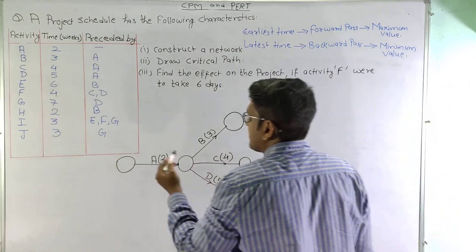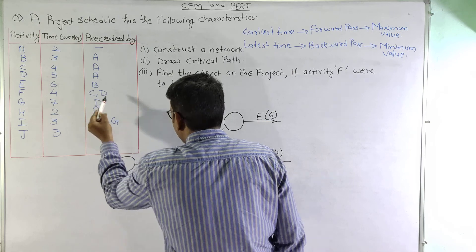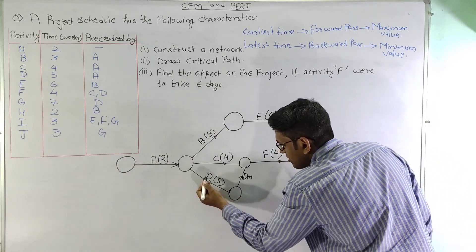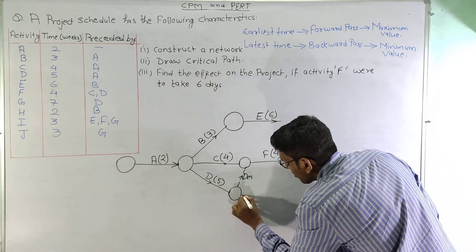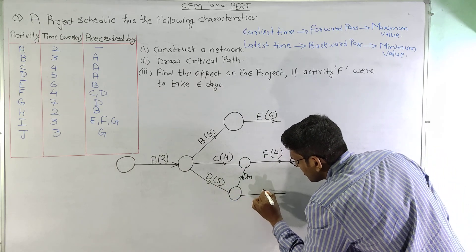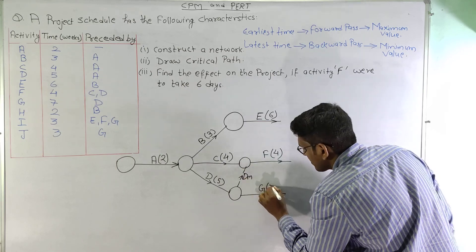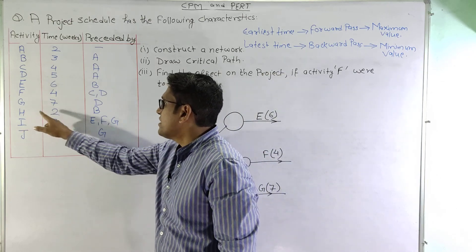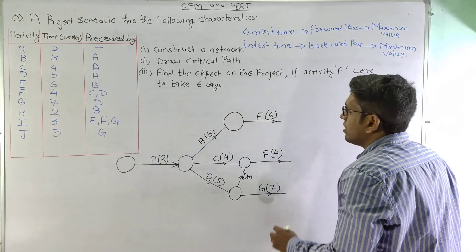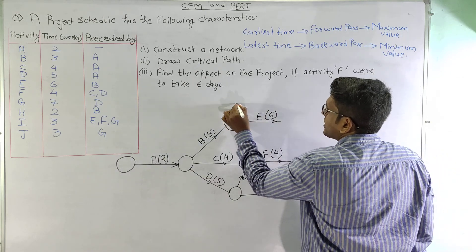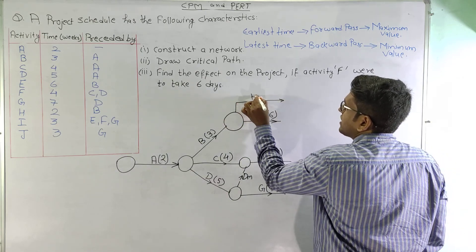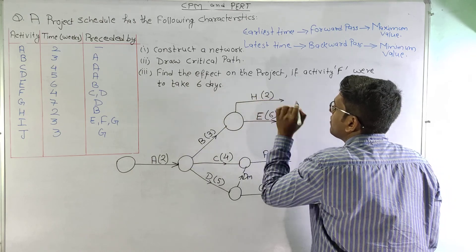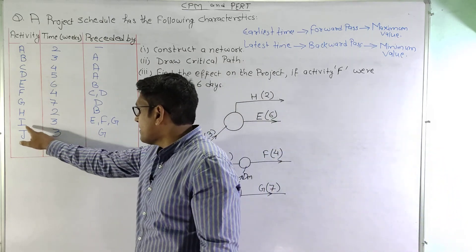Moving on to activity G, activity G depends on activity D only. At the node where only activity D is completed, we can start activity G. Activity G consumes 7 weeks. Activity H is preceded by activity B only, so we draw activity H from the B-end node. Activity H is preceded by activity B only.